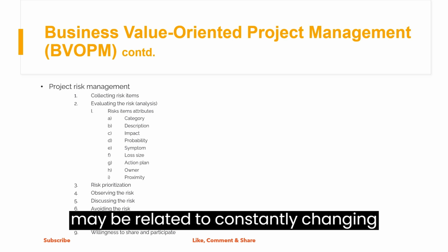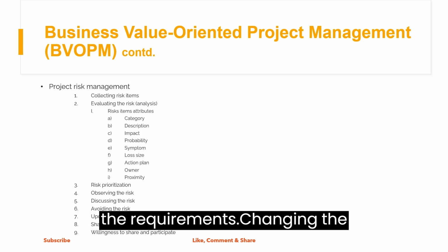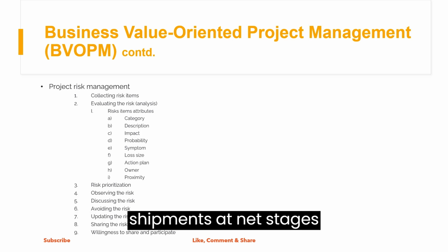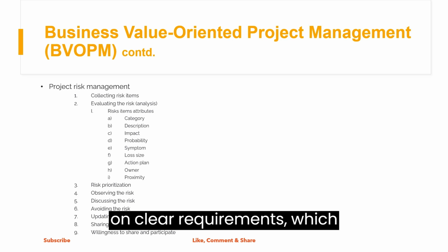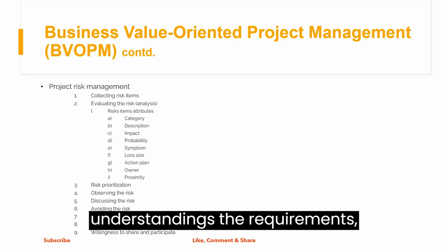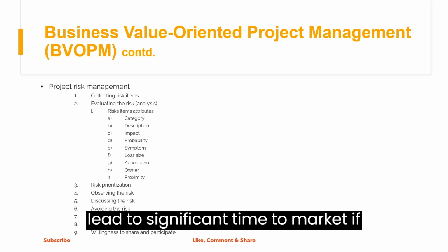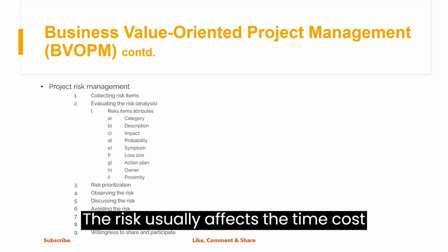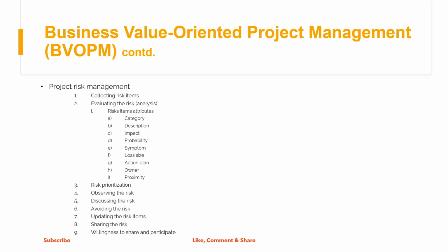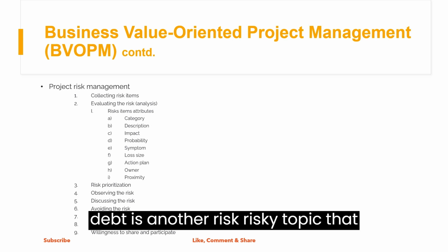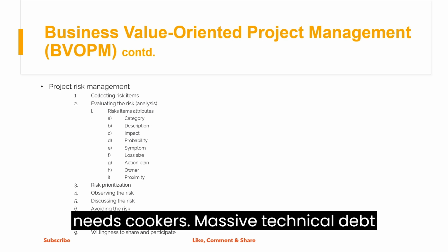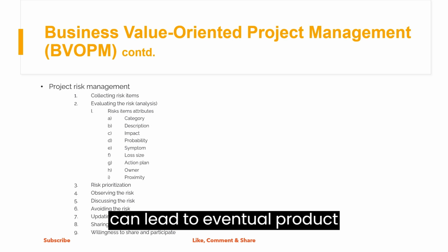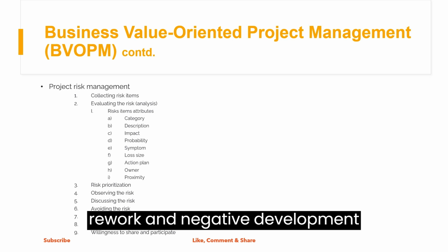Requirements. These risks may be related to constantly changing the requirements at late stages, unclear requirements, misunderstanding the requirements. Technology. Technological risk can lead to significant delays in time to market. If the team uses unfamiliar technologies, the risk usually affects the time, cost, and pre-planned events. Technical debt is another risky topic that needs focus. Massive technical debt can lead to eventual product rework and negative development direction.